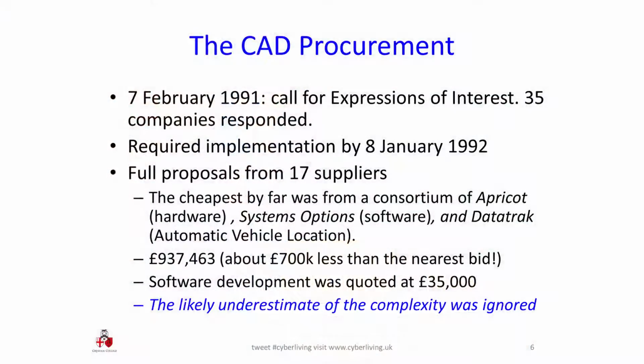They put out a call for expressions of interest. They got 35 companies responding. They demanded implementation by the 8th of January 1992. This is for a call for expressions of interest in 1991. That was an extraordinarily short timescale for what they were trying to do.